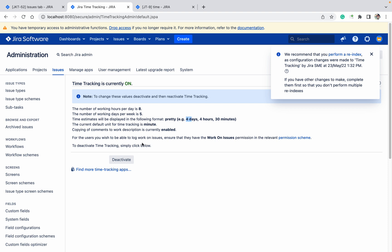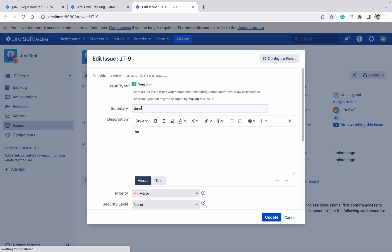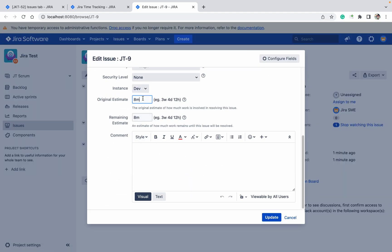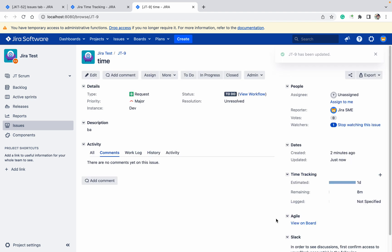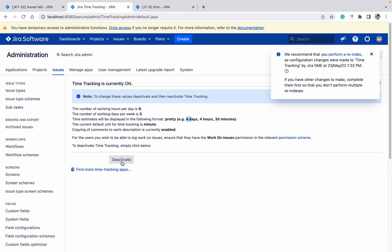If you want, you can change the permission scheme to control who has access. Come here and click Edit. It took eight minutes, but if I now mention eight hours and click Update, it will change to one day — because eight hours equals one day. Like this, you can enable time tracking and see the details.